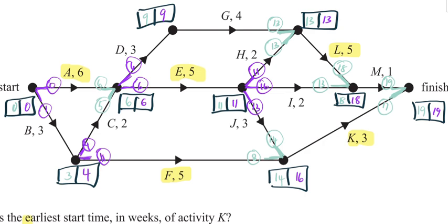what I've done is done a forward and a backward scan. I've indicated the forward scan in green and the backward scan in purple. And now I've also highlighted those activities which can be reduced. So if you look at the places where choices have been made, that is where reductions also are possible.